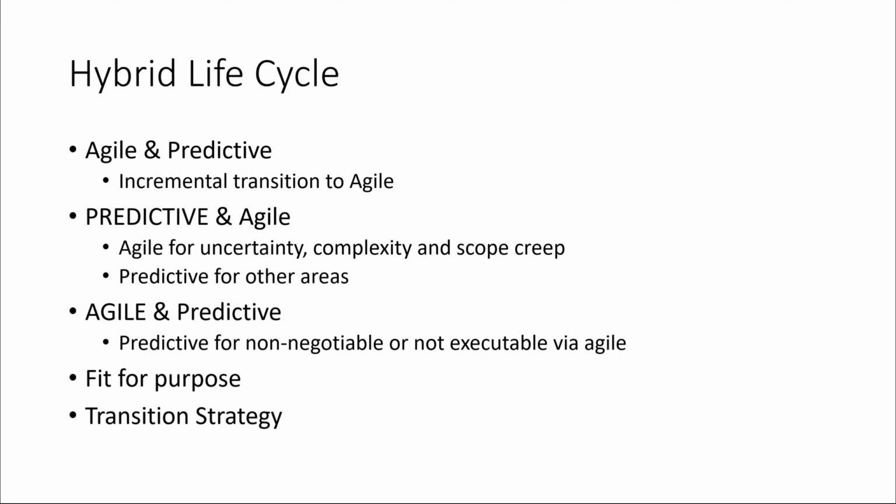An example of this approach would be an engineering firm that is building a facility with a new component. While the majority of the project may be routine and predictable, like many other facility projects the organization has undertaken before, this project incorporates a new roofing material. The contractor may plan for some small-scale installation trials on the ground first to determine the best installation method and to uncover issues early while there is plenty of time to solve them and incrementally improve the process through experimentation and adaptation.